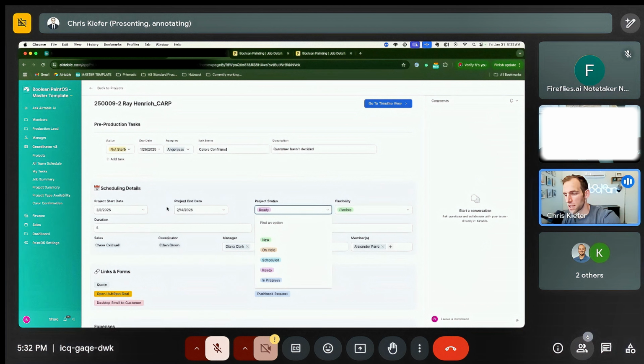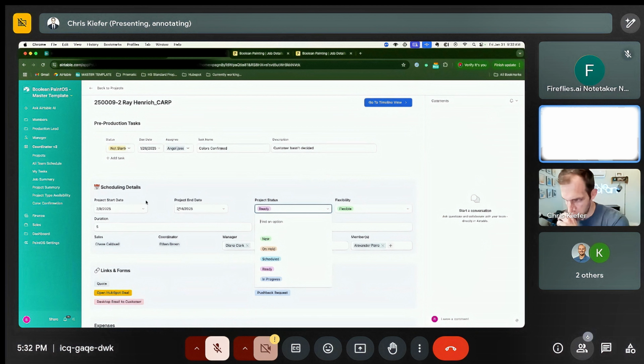If jobs get pushed, you should be pushing them before the day of, preferably. Because of what happened just recently, we were supposed to start 7 jobs in January, and we all had them for that date. Then those guys called us the day before and told us they're not going to be ready till February. So that's already all set up in there. If it was supposed to start then, we have to go in there manually to change all of that.